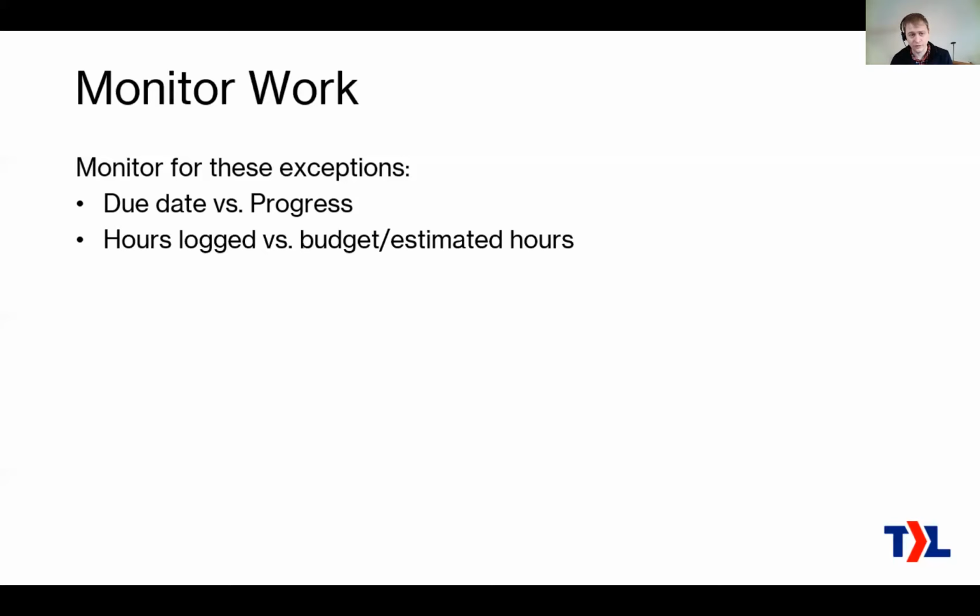They can tell you whether, hey, they're 95% done, just need to do some documentation or whatever, or hey, this turned out to be way more work than we thought. Maybe we don't even want to do it anymore because I still don't see the end of it. So monitor that, because those are things that you want to be in front of, so you don't come back and all of a sudden there's 10 hours or 15 hours logged on a ticket that you thought was going to be 4 hours. Customers don't like to hear about that for sure.